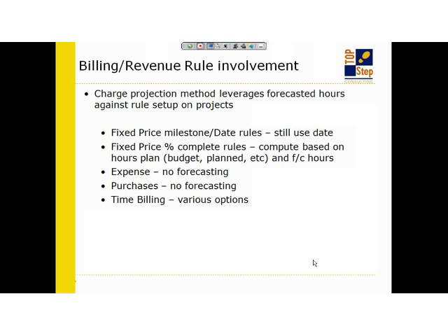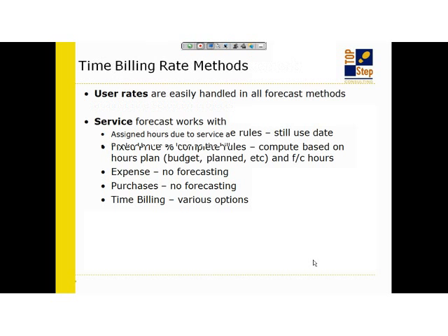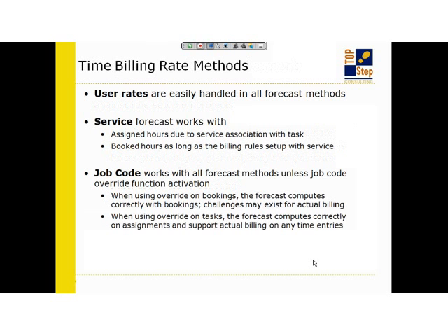And then, of course, the time billing rule has lots and lots of options. So I thought I would take a moment to walk through some of those billing rate methods and how they will work in conjunction with forecasting. So user rates, quite a few use user rates and rate cards, easily handled in all forecast methods, no limitations on assignments, bookings, that kind of thing.